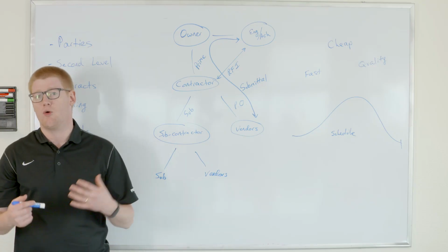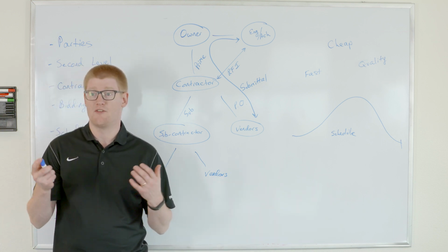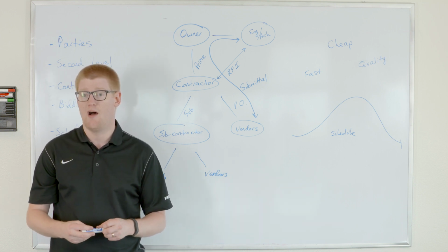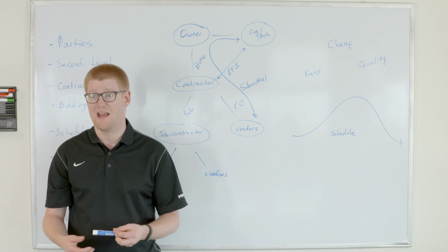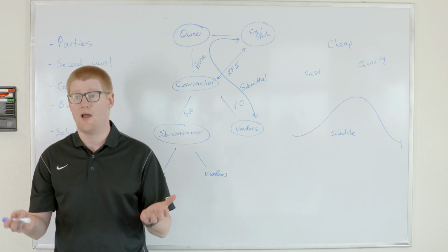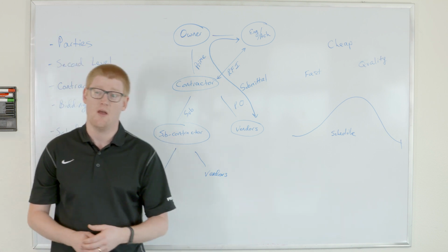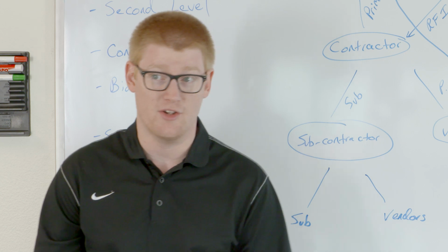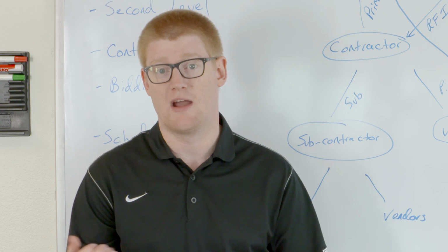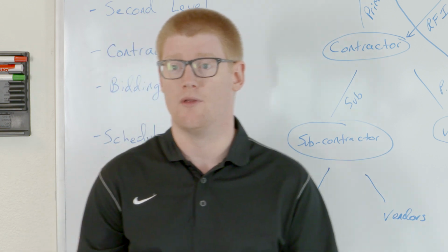Realistically, in general, Procore handles a lot of different budgeting tools from the aspect of a project manager. Project managers are often held accountable for their project making money, making bank, and succeeding, but often they don't have access to the accounting systems that track that money. It's kind of a black box that's kept at the corporate office that they don't have access to. They're reliant on reports. Procore provides enough tools for the project manager to do his job on the job site. That includes everything from the main contracts to the budgets, to the subcontracts, the large purchase orders, even payment applications and tracking of retainage. So there's a lot of different aspects of cost management that Procore really helps with.